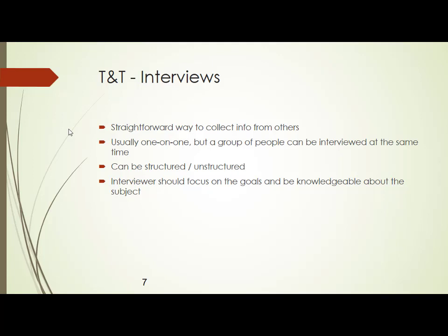Now, for collecting requirements and talking to the stakeholders, interview is one of the tools and techniques. There are two ways: it can be structured or unstructured. Structured means I will have a set of questions to ask. I will ask those questions in the interview, the person in front of me will give me the answer, and I will take those requirements and come back. That is one way of doing it.